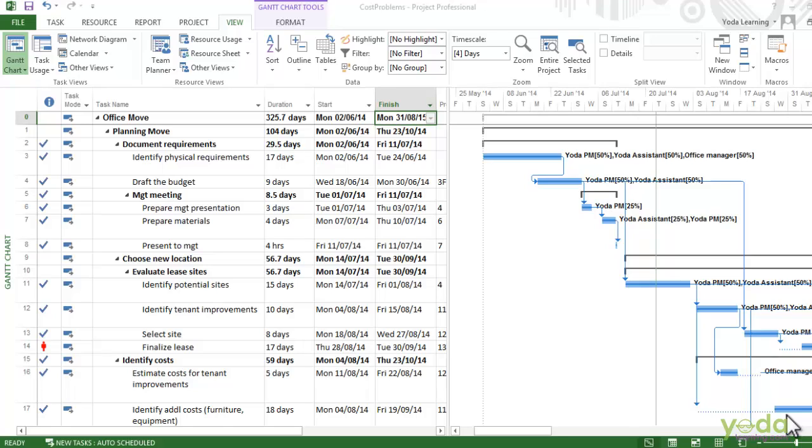While a project is underway, you need to keep an eye on the costs. Project has tables, filters, and reports that help you look at the project costs and find the tasks or resources that cost more than planned. The first place to look is the cost table because it shows the cost variance.